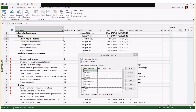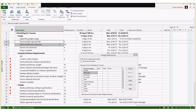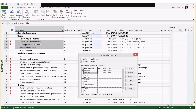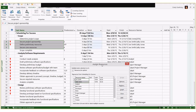For example, 'determine project scope' had a duration of five days but only 10 hours of work. I'll assign Bob to that task and notice it shows Bob assigned at 25% — because it's going to take five days to do 10 hours of work. For tasks three, four, and five where the same resources work equally, I can highlight all three tasks, then hold Control to select both Joe and Sally, click Assign, and boom — both are assigned to all three tasks at once.